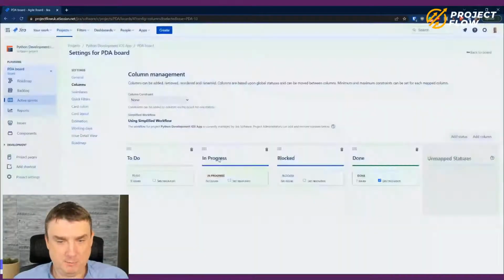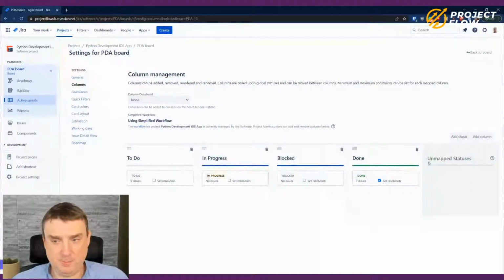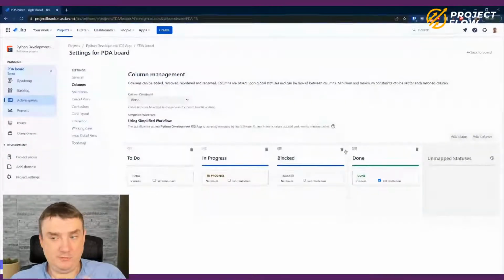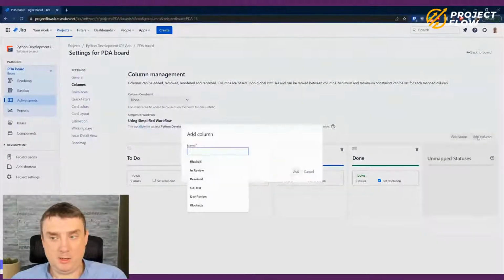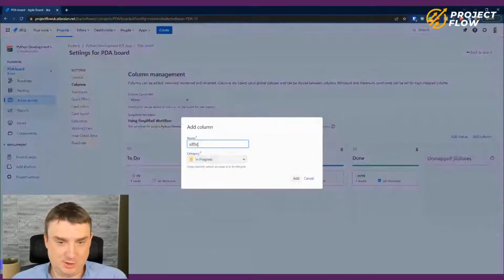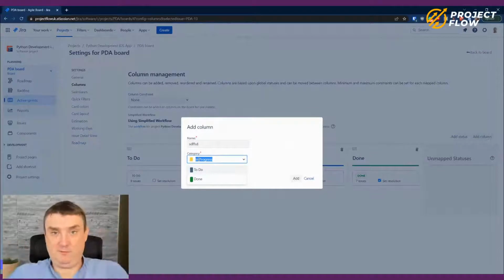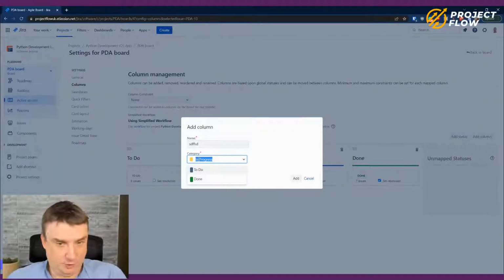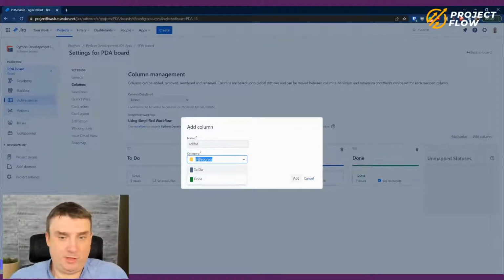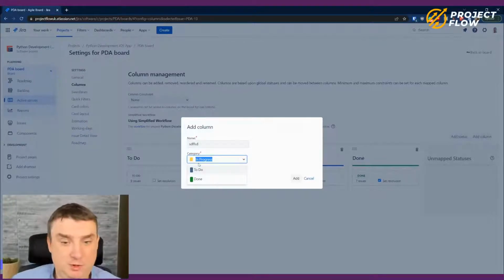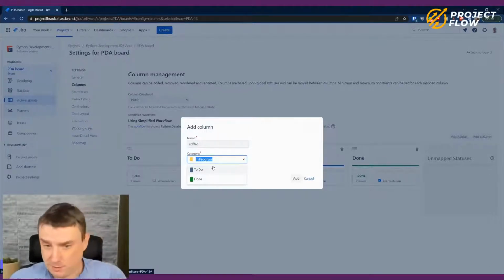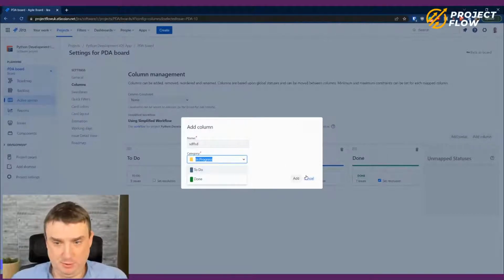There you go. And by the way, that category is just visual. Something really interesting happens if you've never done this before. Jira is going to ask you what category you want to add. And I strongly believe it should be, because this is for you, in a binary mode: no work, to do; in progress, it's work. So I put a 1. But if it's actually blocked, there's no work. That's why it should be to do. But it's up to you. If you want to use it in a different way, no problem.